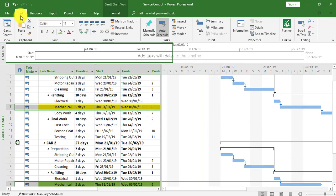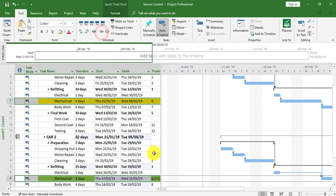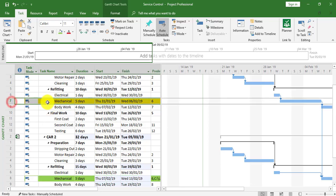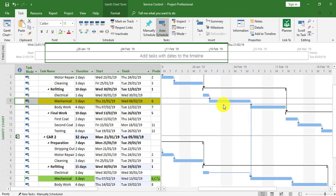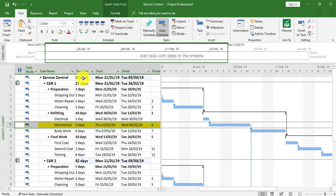I'm now going to click onto the Task tab and use the 'Link the Selected Tasks' option. We can now see that the yellow mechanical task bar is now linking to the task bar in Car Two for the mechanical task. These are now linked with a finish-to-start link, and the duration has now gone to 32 days.